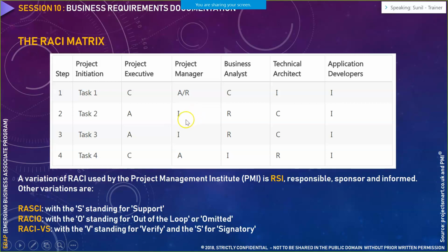That is optional to you. You could inform multiple people. You could consult with multiple people, but accountability and responsibility lies with only one person for a given particular task. You cannot share the accountability and responsibility. In a given task, there would be only one person who is accountable and responsible. You cannot have two persons held accountable for one particular activity, or two held responsible for one particular activity. So that's the difference in this particular grid.